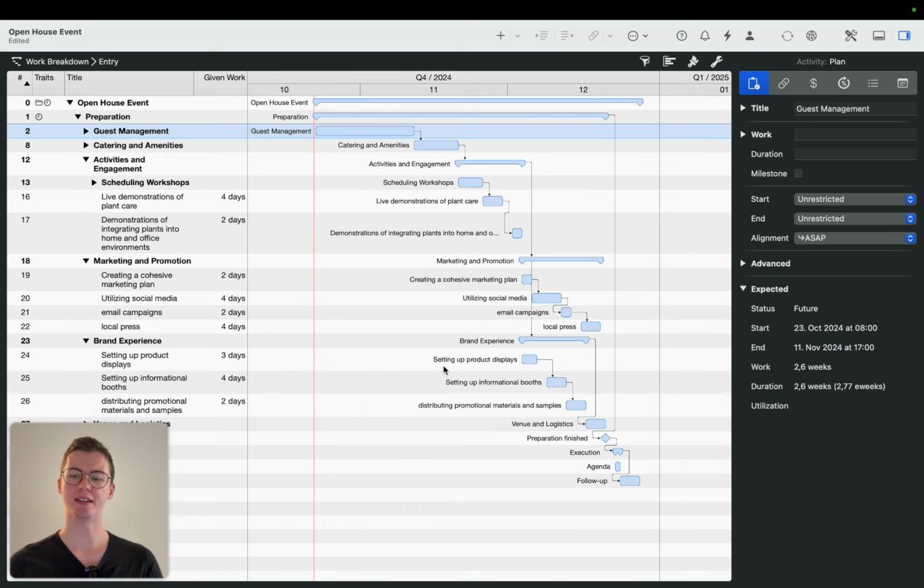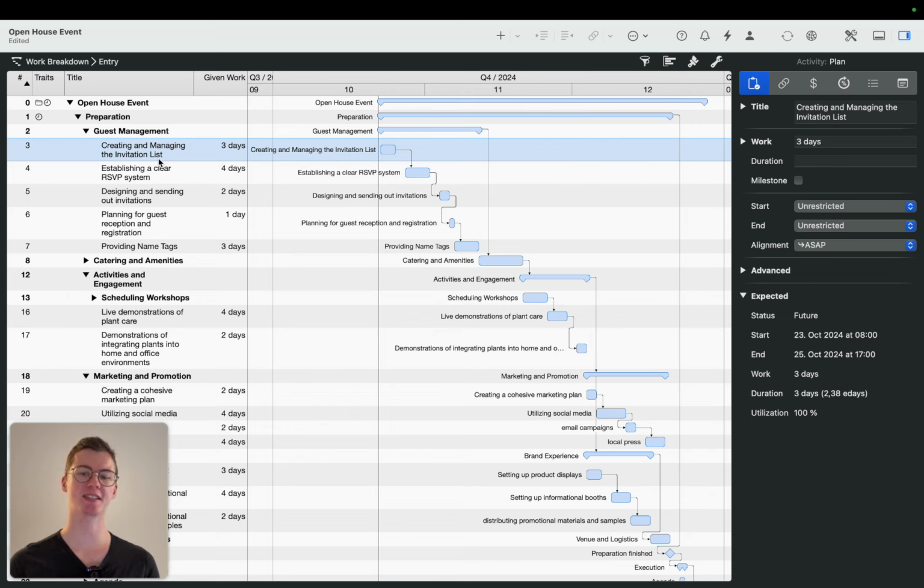I've already promised you that we're going to discuss work and duration. So just as a short side note here, we have some activities that we can 100% steer ourselves. So for example, in this case, creating and managing the invitation list. This is all done by us. So we pretty much know how much work we are going to take for it. In other cases, we are a bit reliant on other people, for example. For this, we have the duration, because there are some time delays, like for example, shipping delays that we can't do anything about ourselves.